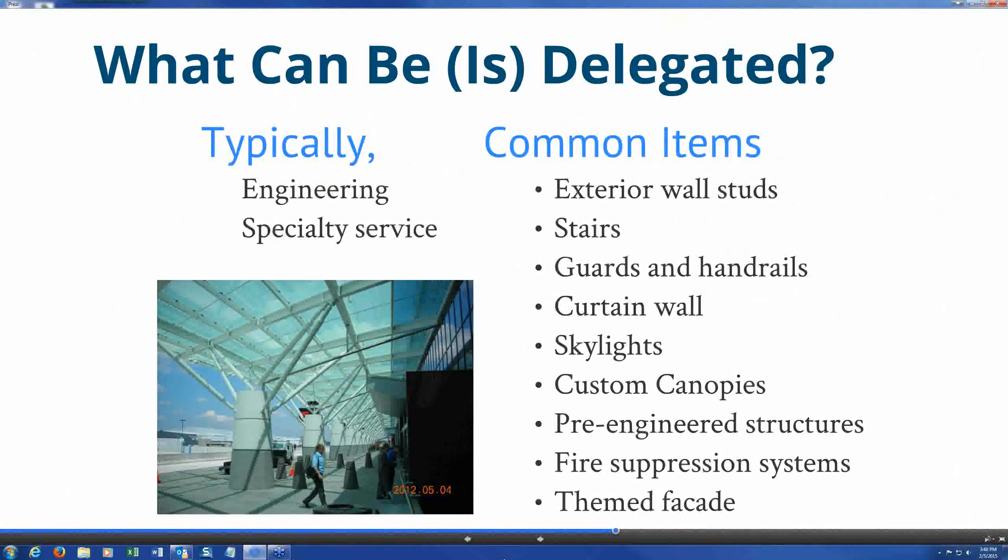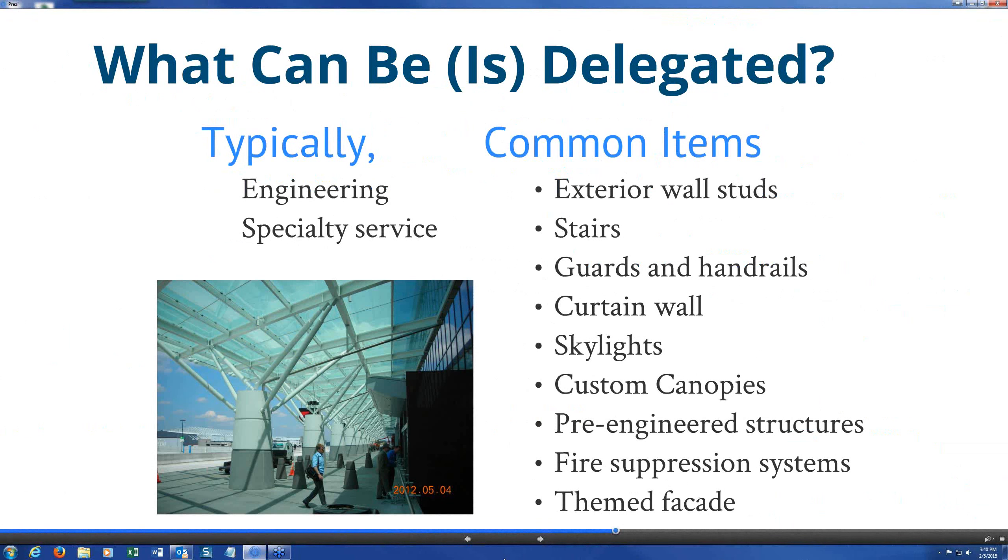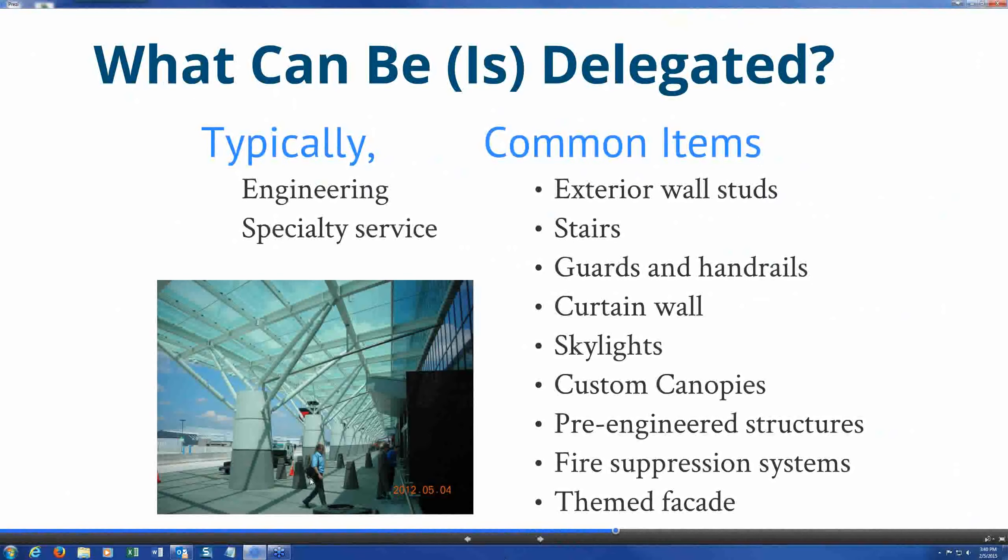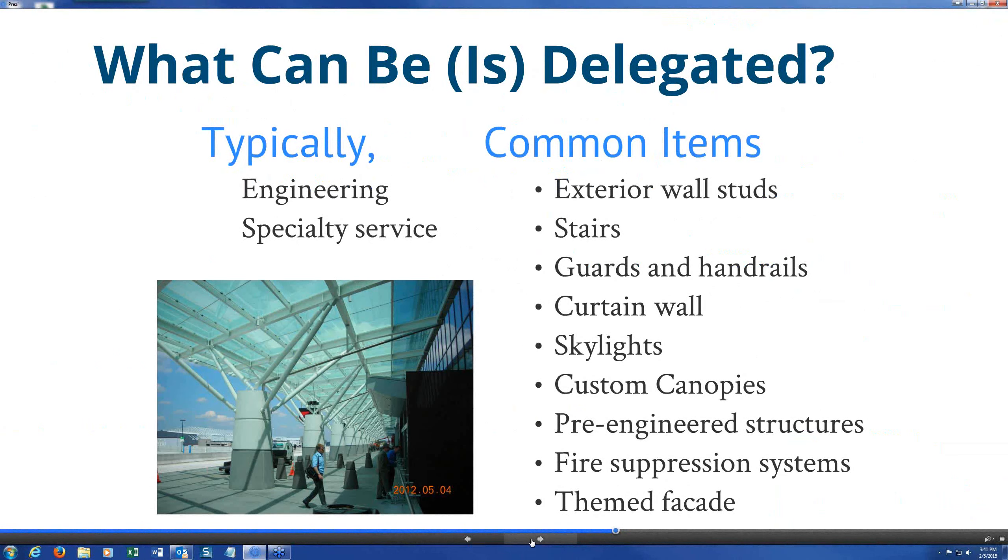That would certainly be an interesting themed sort of feature. And here we see a custom canopy where, again, this was done by our firm at the new international terminal at the Atlanta airport. And we drew some sketches that are basically concept sketches, and then a specialty contractor took it and designed it and was responsible for all the engineering, selecting the glass, and installing it at the same time. And we might say that most of these delegated design things are delegated design build, that the entity who is designing them is also going to install them. Well I think that's normally the case because you're asking the subcontractor to provide the design service. Typically.